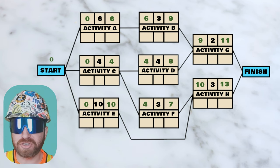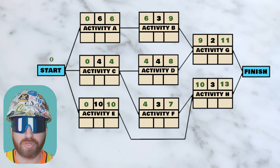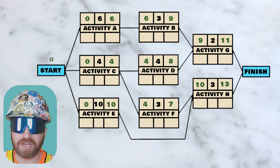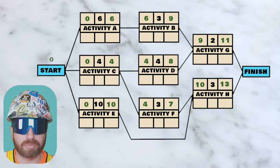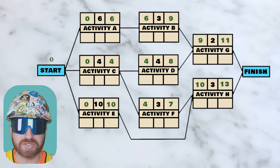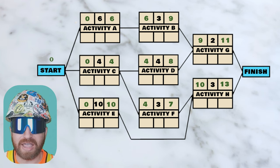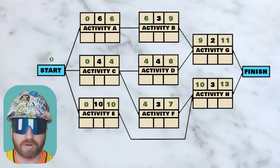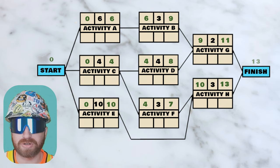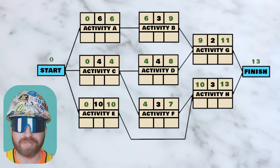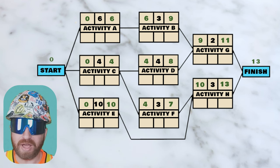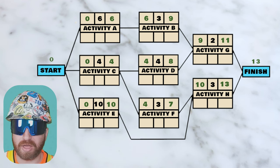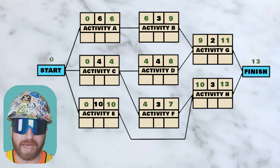We're at our finish milestone, which is dependent on both activity G and activity H being completed. Activity G can wrap up, but the project won't be complete until activity H is also completed. Since H is ending later, our finish milestone has to be associated with H on day thirteen. We've determined the length of our project by completing this forward pass, but we have not yet established our critical path — so we have to complete a backwards pass.